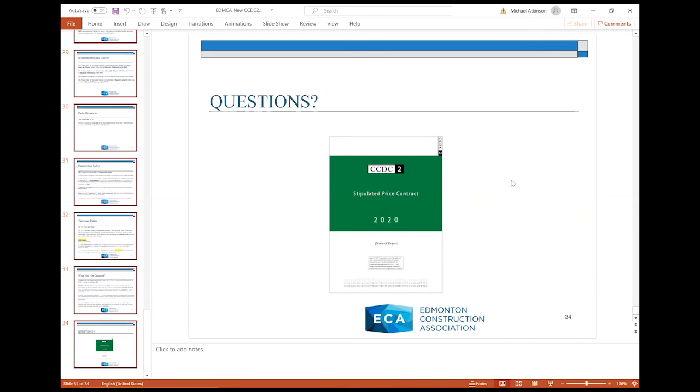So the first question here, when new payment legislation comes into effect, will it apply to partially completed projects, or will they be grandfathered to allow them to complete under the previous terms? That's a question for people putting your legislation into place. That obviously is not impacted by the contractor CCDC-2. What we did in Ontario is essentially we used when the projects were closing for bid. So if a project was already on the streets and already underway, the new legislation didn't apply to it. It only applied to projects that were out for bid, if you will, after the effective date.